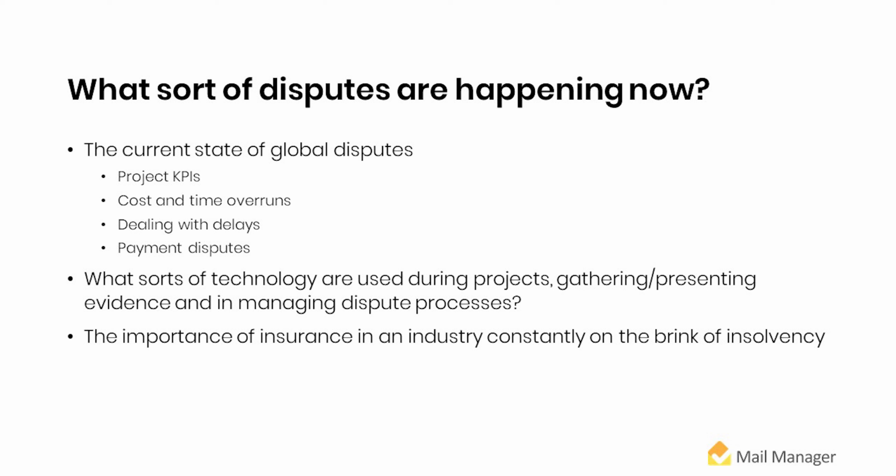What's been interesting recently is that we've introduced new legislation in my jurisdiction in Ontario, guided at prompt payment and adjudication primarily, but behind the flashy prompt payment and adjudication introduction, which obviously the UK has been dealing with for years, but we're very excited about here since it's brand new, has been mandatory public bonding on projects of a certain size. And so putting those mandatory bonds in place is intended to create a little bit more safety for some of those situations on public projects. But whether or not it does anything other than sort of increase the amount that gets paid to sureties remains to be seen.